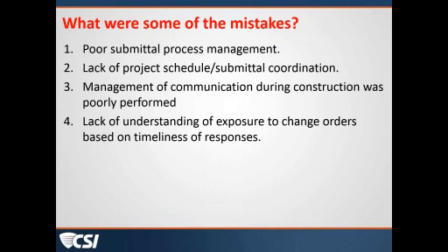So be careful about turnaround times, especially when you're doing larger projects and you know you're going to get huge submittals. I know precast, structural steel, submittals like that that are going to involve other consultants. Typically it will take longer to do, so just be cautious of committing to a certain number of days. And if you do, make sure you stick to that day.